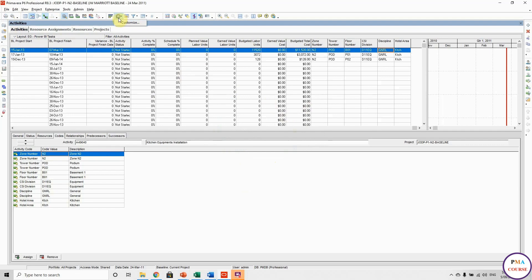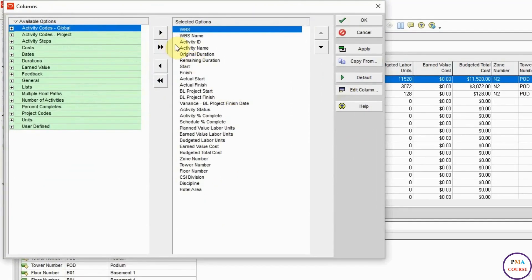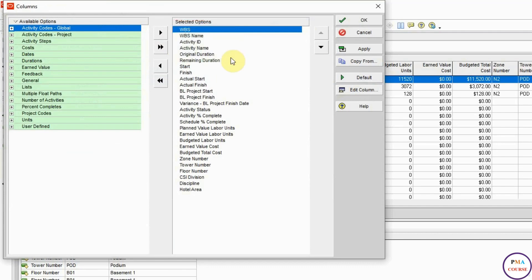So this is what we have — the main information that we need. It's very basic information like WBS, WBS name, activity ID, activity name, original duration, remaining duration. These are basic information. After that we have dates: start, finish, actual start, actual finish, baseline start, baseline finish, and variance for finish date.